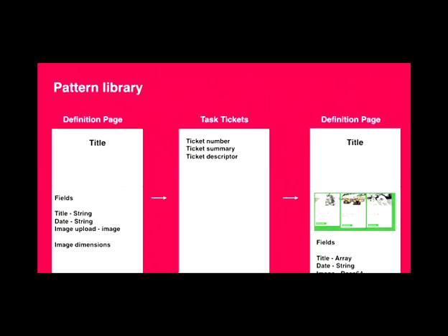And if possible, you can then get in the flow. So we're a distributed team, so we're doing this on a wiki. It might be that if you're co-located, you just do this on the wall in the office, and everyone can kind of look at it and grab things and understand what's going on. But we have wiki pages which exist for each of these components. We're defining the components collaboratively. We're giving them names, and then because they are individual things, they can be given Jira tickets and they can be tracked through the process.